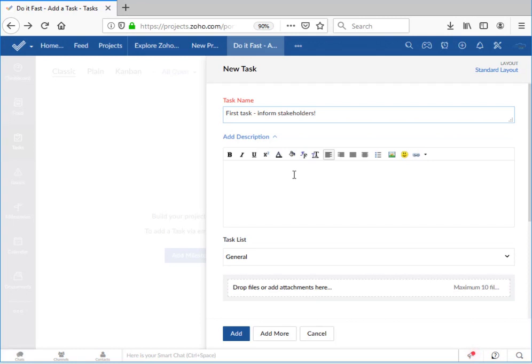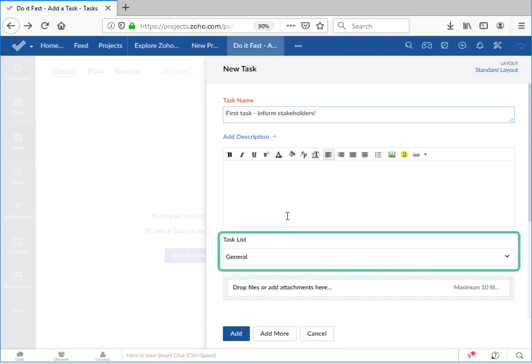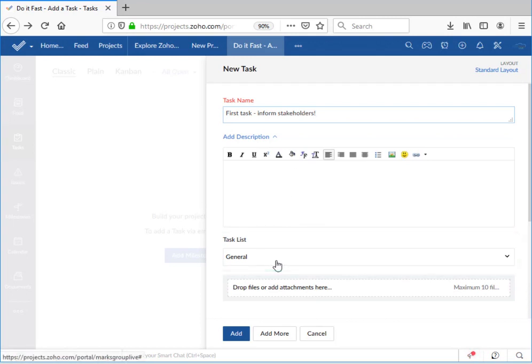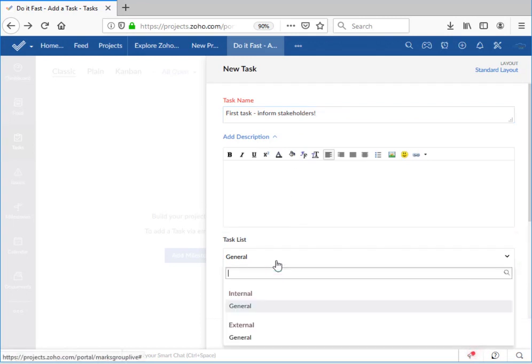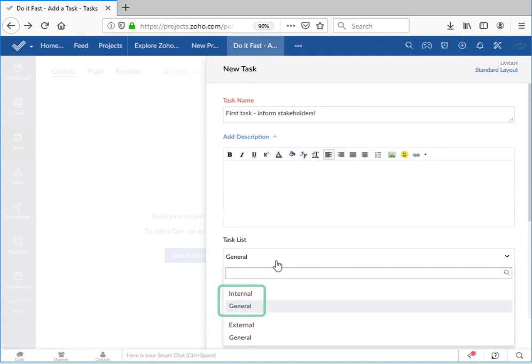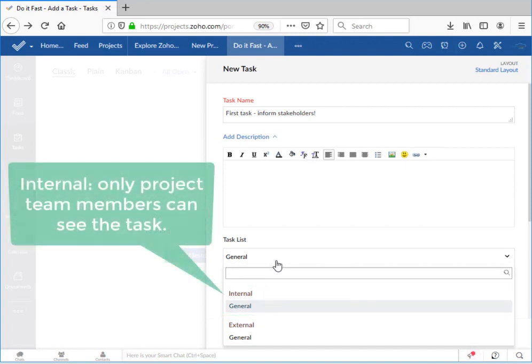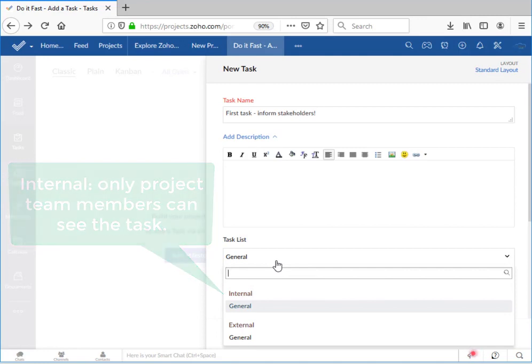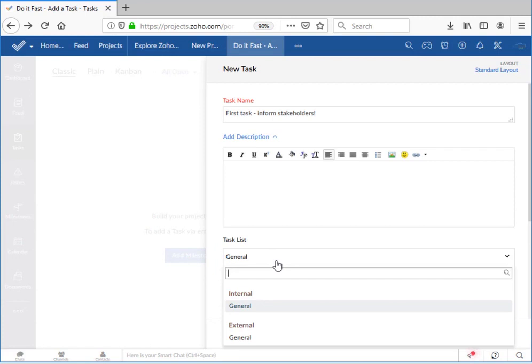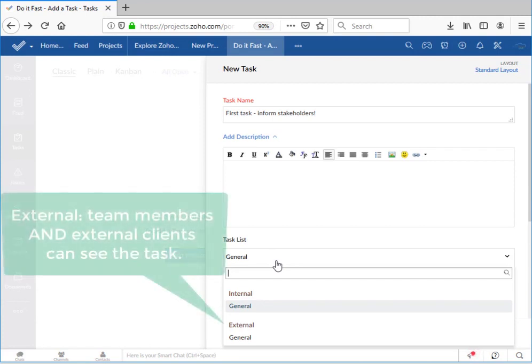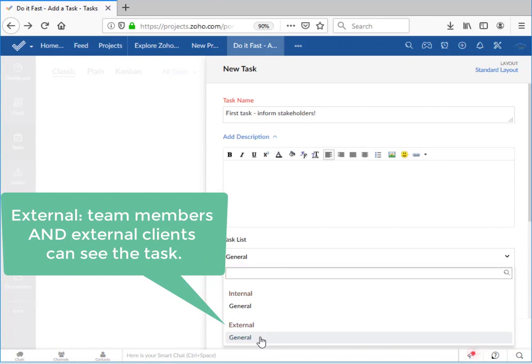You must associate the task to a task list. The default task list in Zoho Projects is the general internal task list. That's just a default dumping area. The fact that it's internal means that only members of your project team will be able to see the task. To give access to an external client you can set this to the external general task list, which means that your team and your client will be able to see the task.